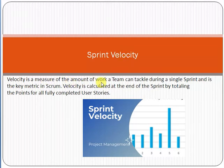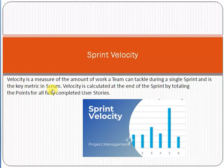Sprint is a three to four week time period and is the key metric in Scrum — a framework for project management that we use for managing software projects. Velocity is calculated at the end of the sprint by totaling the points for all fully completed user stories.